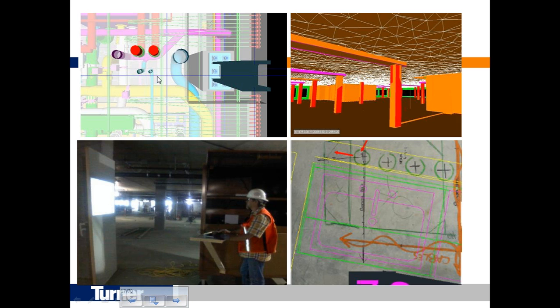At that point, a couple adjustments were made, and then we went out and took the coordinates and installed these pieces. The great part about this is, again, another creative way of using the model. When the structural engineer came to walk the deck the day before the pour, there were no issues. Not the mad scramble that often happens. Again, utilizing that model as a communication tool.